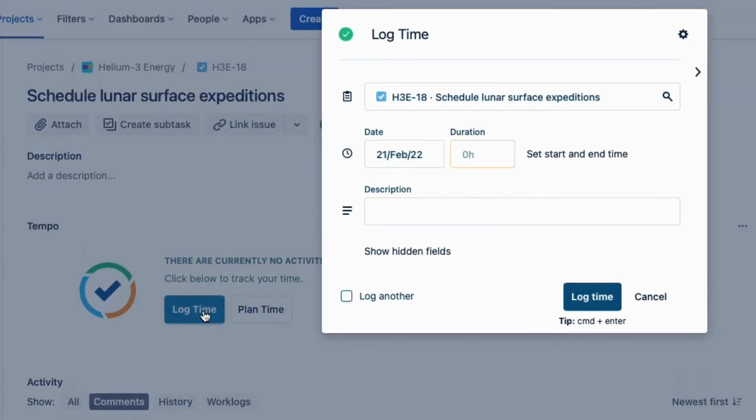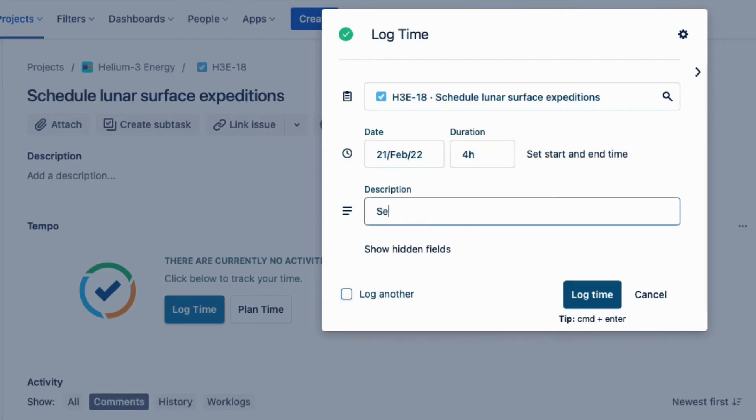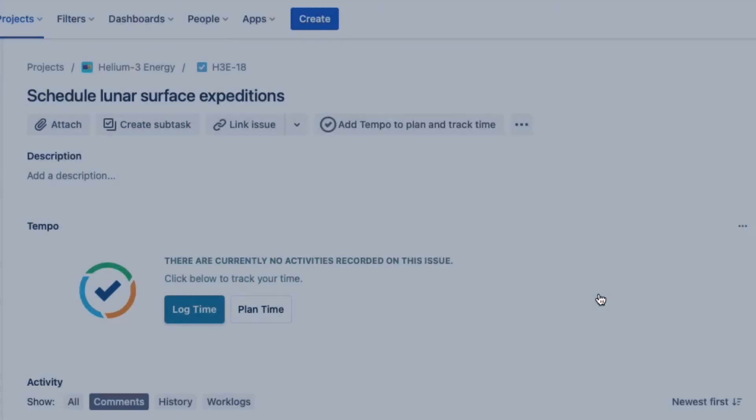In the Log Time form, the issue is already selected, so all I need to do is fill out the number of hours worked in the Duration field, maybe add a description, and click Log Time.